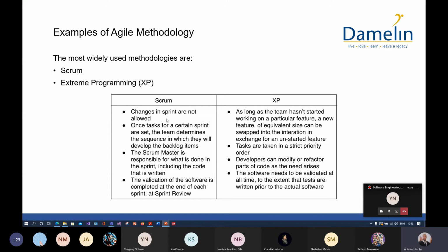So with the Scrum methodology, we have, as part of the project team, the project owner, who in this particular case will be the customer, the person we're doing the project for, whoever's sponsoring the project. Then we have someone we call the Scrum Master, okay? And this person will be basically a senior developer.